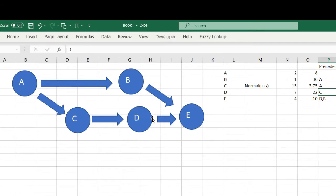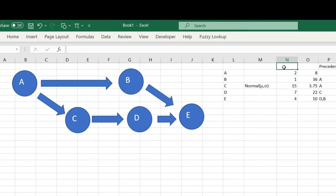So I'm going to apply Monte Carlo simulation to try to come up with the finishing time. Here I have used two distributions. This is the time for each activity, so activity A is from 1 to 8 days, activity B is 1 to 36.